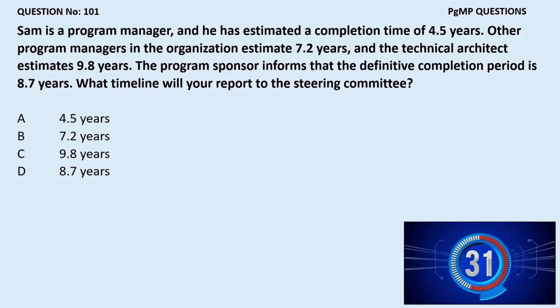No, because the question you are asking is that the components have delivered the benefits, but my program is still open. If I have delivered 1000 megawatt, but now 500 megawatt is being produced, that complete responsibility is still under my program, because I didn't hand over that particular component.